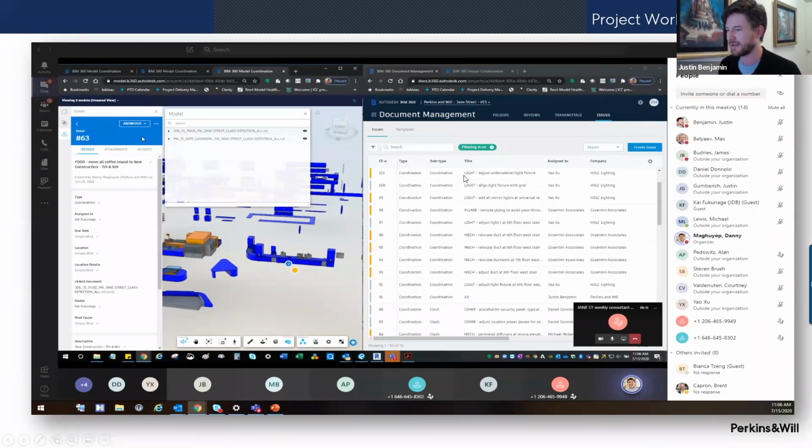So when you filter live, heck, you could filter also by location. As long as you upload locations to BIM360, you can say, look, I'm talking to structural and mechanical for the first half of the meeting, and we're going to go floor by floor. So you can filter the issues specific to those two disciplines, and then let's start with only issues associated with the first floor. Got it, we're all good, excellent, let's go to the location for the second floor. And again, you're making filtering live that much more beneficial, that much more intentional.